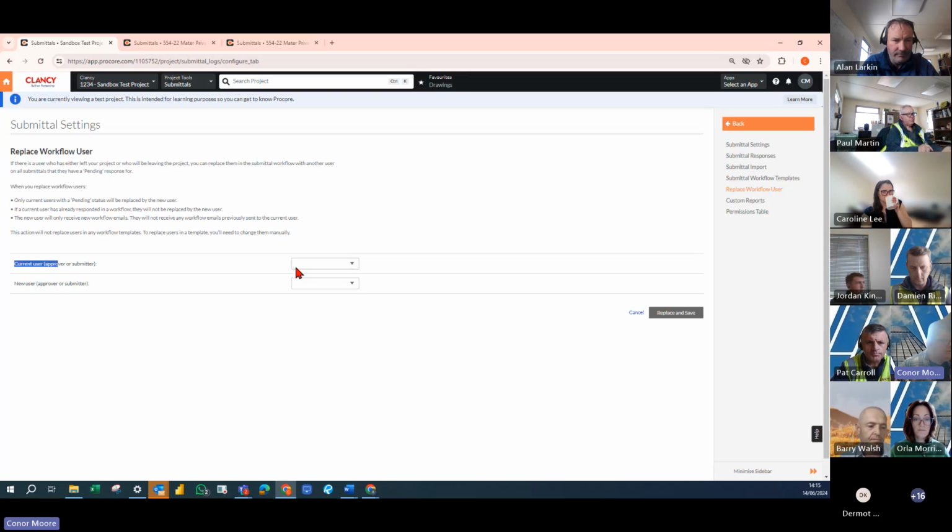So whoever the current user is, let's just say that it's Trent. And Trent has now left his company, and we want to replace all the submittals that are open with the ball in court with Trent. We want to replace them with Andy. So any submittal workflow that's open that has Trent with the ball in court will now be moved to Andy instead. And all this will be documented as well. So if you do change it, there is a change history, and you'll be able to see that you took out Trent for Andy on such and such a date at such and such a time. A very useful tool. So to do that, all you do is press replace and save, and that's it.